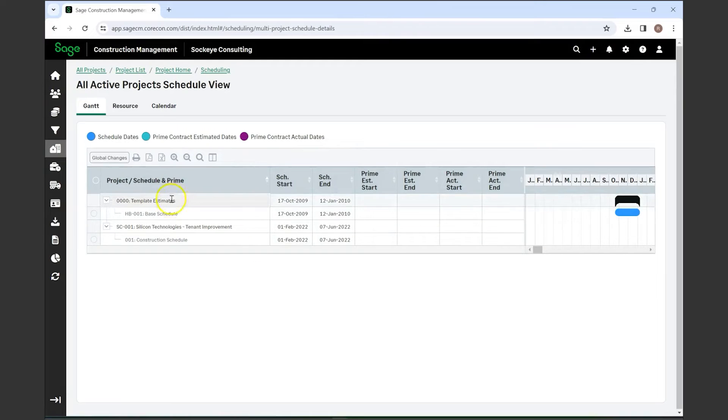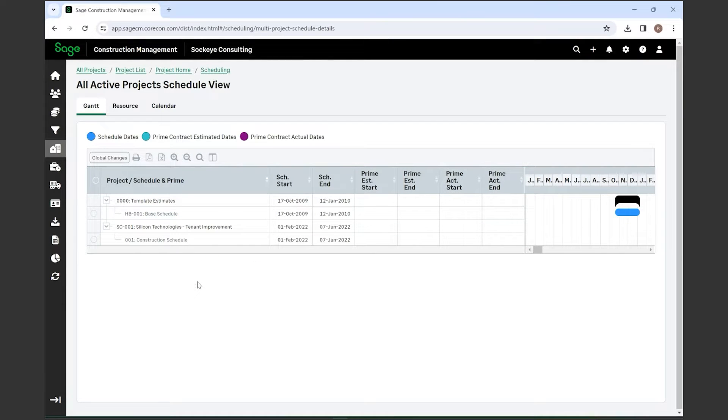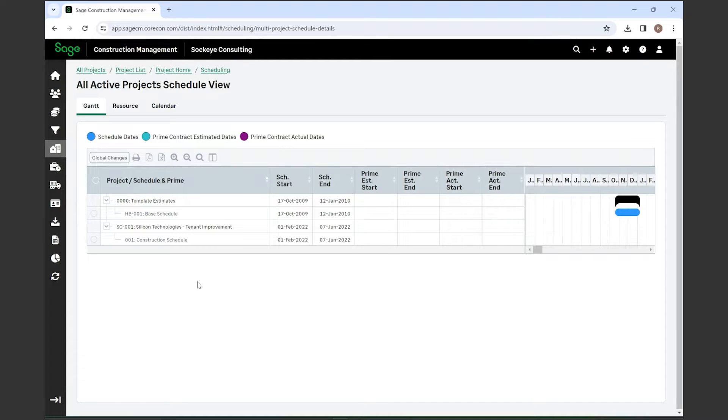When you open it up, you'll see any projects that have a current schedule in the system. It gives you a really great way to see any upcoming resources that you have towards certain projects. If a project manager is on several projects, you'll be able to break them up within this schedule so you can see where your resources are or where you need more resources.